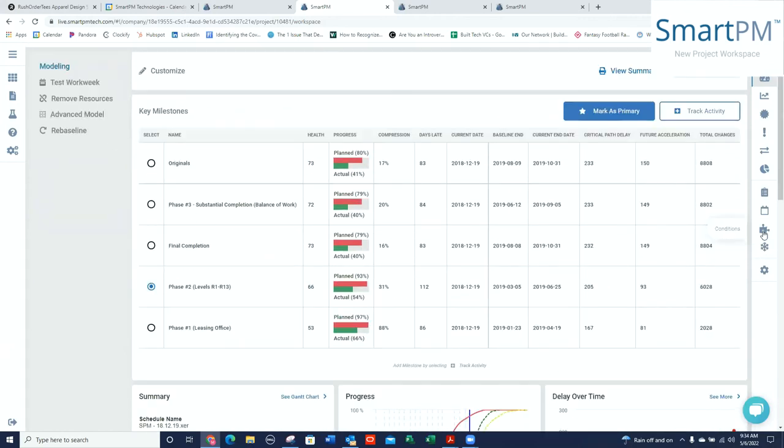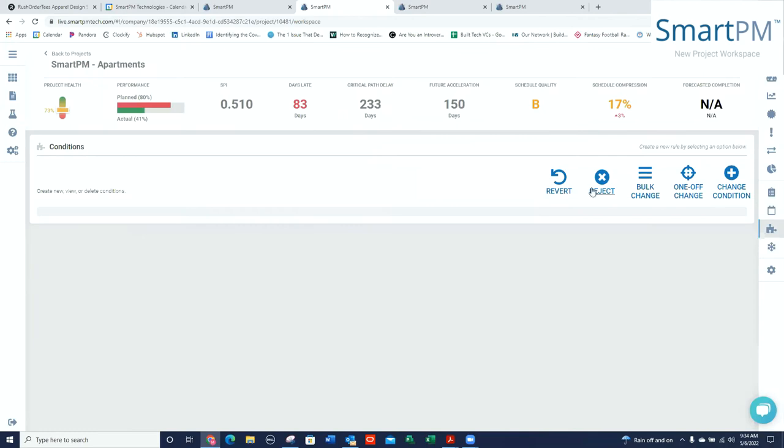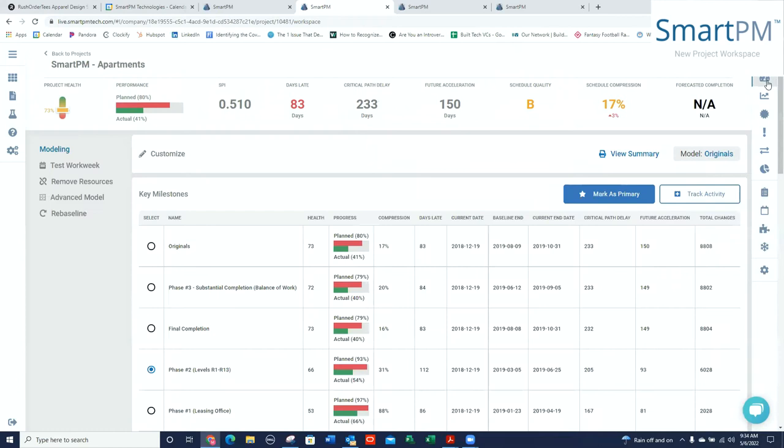Where you can be setting up conditions to do various things like update the schedule, put in TIAs, do some bulk change stuff, reject changes, revert changes. I also have that ability over here in our modeling tab where I can be testing calendars on certain activities to see what that means for the end date of a job or a series of activities leading to a milestone.